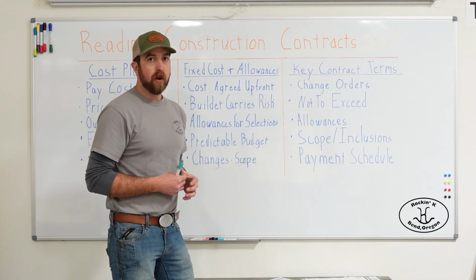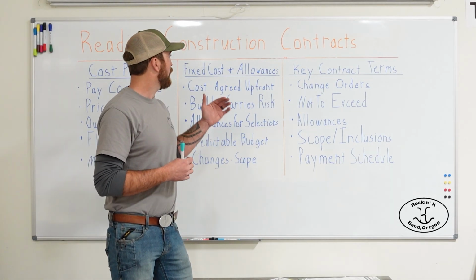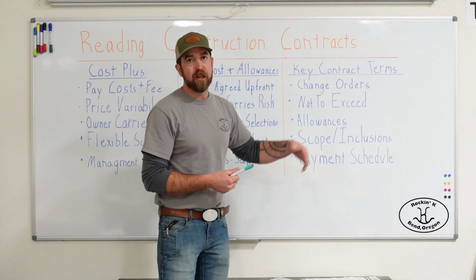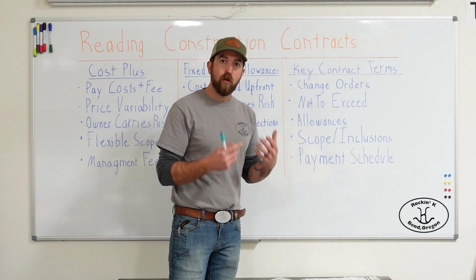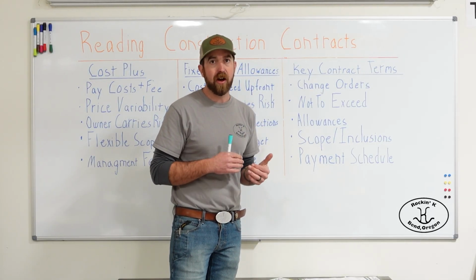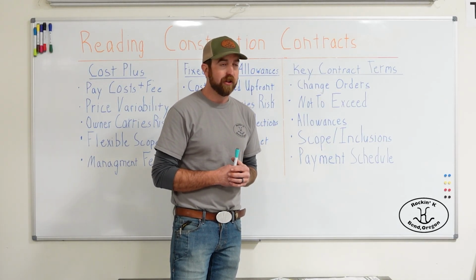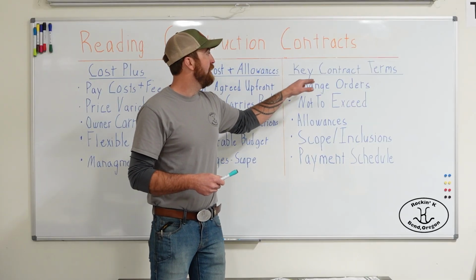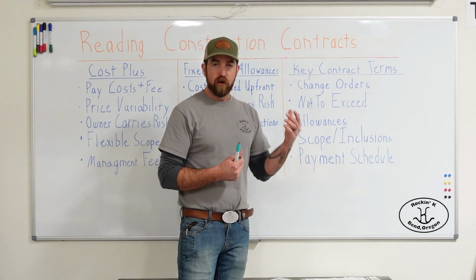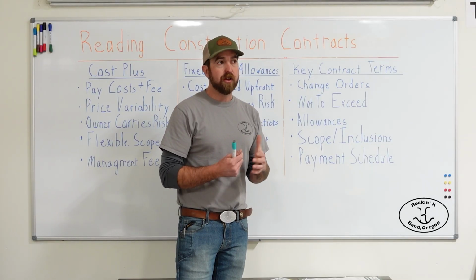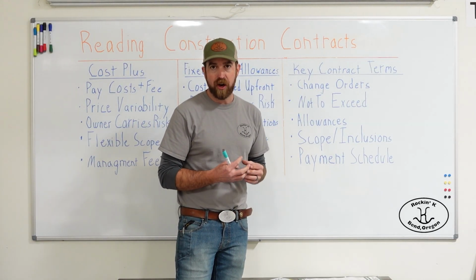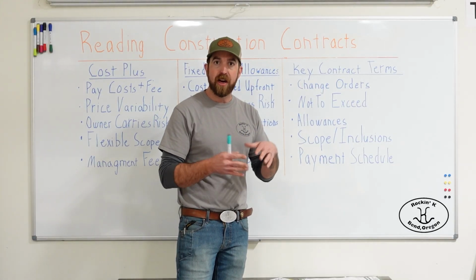So regardless of whether the contractor, the builder is calling it fixed cost or cost plus, these are some key contract terms that you still really want to dive into and make certain you have 100% understanding of how that contract works. So change orders. We need to know what can trigger a change order, who's responsible, because at my company, at Rockin General Contracting, the only way you get a change order is if you increase scope.